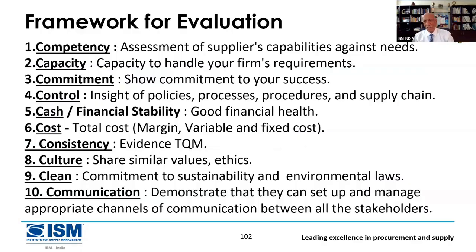So this is the competency. My needs are X, Y, Z. This supplier is checked against my needs. It can match my requirement in terms of specification, in terms of international standards. Like if I want to supply any item to Europe, it has to come as per EU standard. Capacity to handle your volumes. I need 10,000 pieces every week. Can this company give me? If not, out. So commitment shows commitment to users.